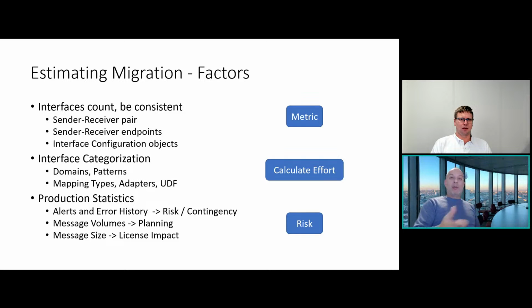And here there's tons of methodology. As you said yourself, Daniel, you classify easy, medium, complex. You say that the easy are 3 hours, the complex are 16 hours, very complex are 20 hours, and then you just start adding up depending on the number of interfaces that it has.